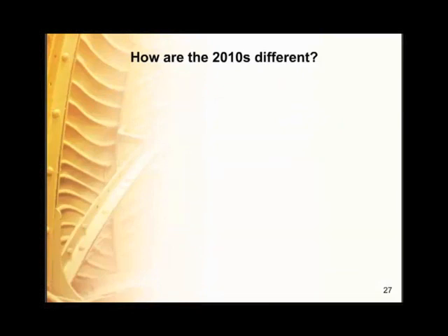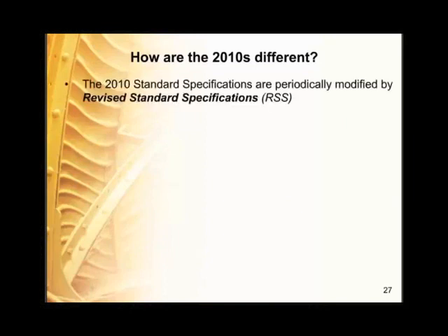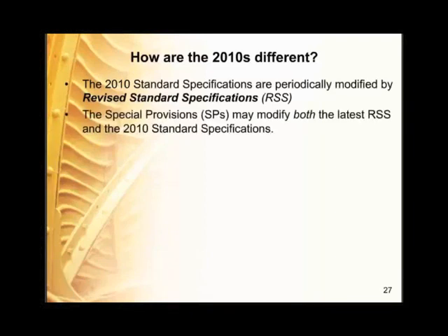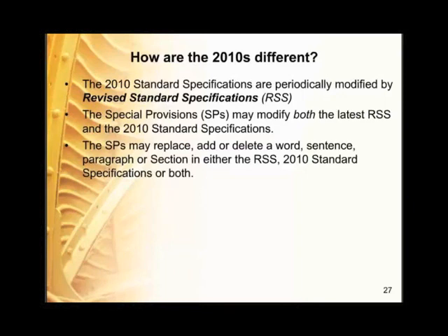To continue how the 2010s are different, the 2010 standard specifications are periodically modified by revised standard specifications, otherwise known as RSS. The special provisions, SPs, may modify both the latest RSS and the 2010 standard specifications. The special provisions may replace, add, or delete a word, sentence, paragraph, or section in either the RSS, 2010 standard specifications, or both.